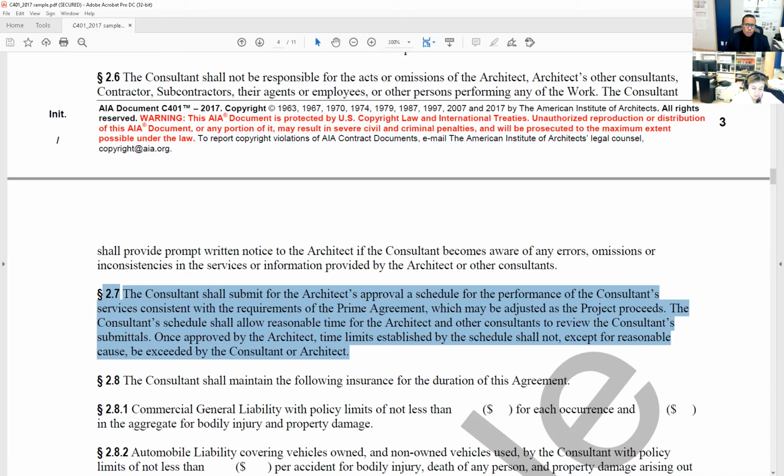And when you read the A201, you're going to see that the contractor is supposed to provide us a submitted schedule, and a schedule in general for the construction, which shall comply with the goals that the owner has established for the project regarding initial and final completion. And it should not just be messed with. If it grows or shrinks, it's got to be done by change order and approved by people with the authority to do that.